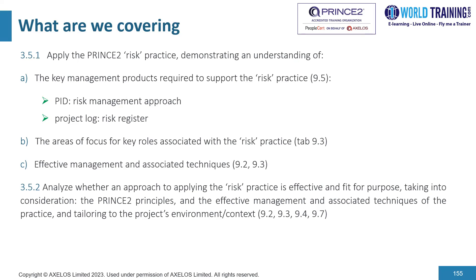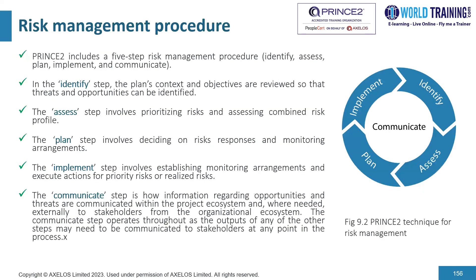Let's briefly examine the risk management procedure. There's a five-step procedure recommended by PRINCE2, as you can see on the diagram on the right side. Step number one is Identify, wherein we plan the context and objectives of the project, identify the context, and identify the risks and opportunities.